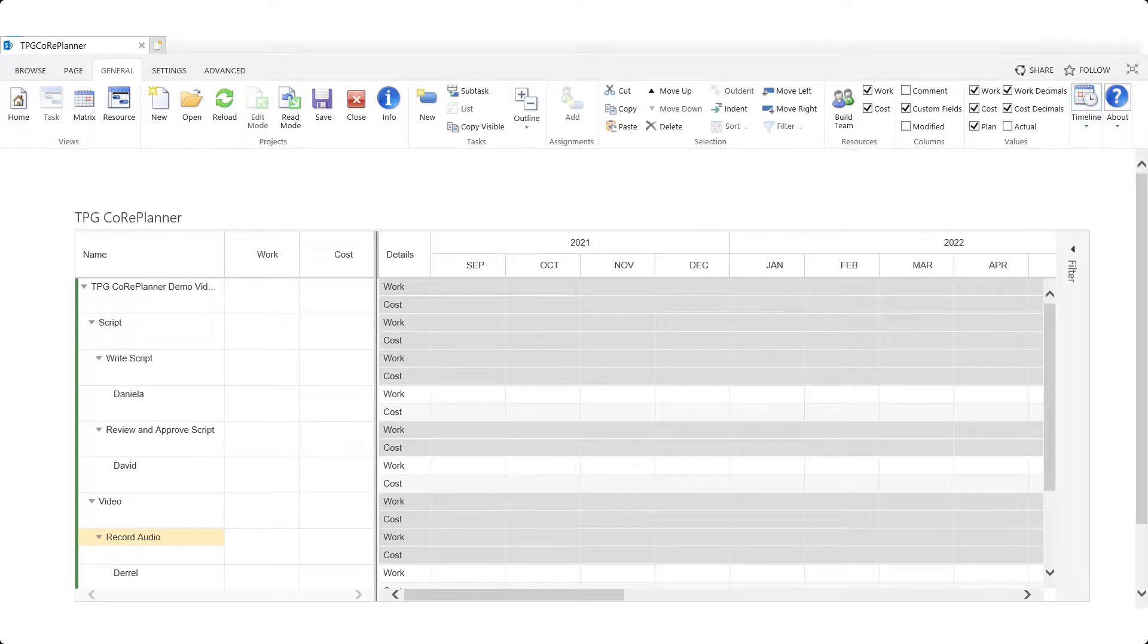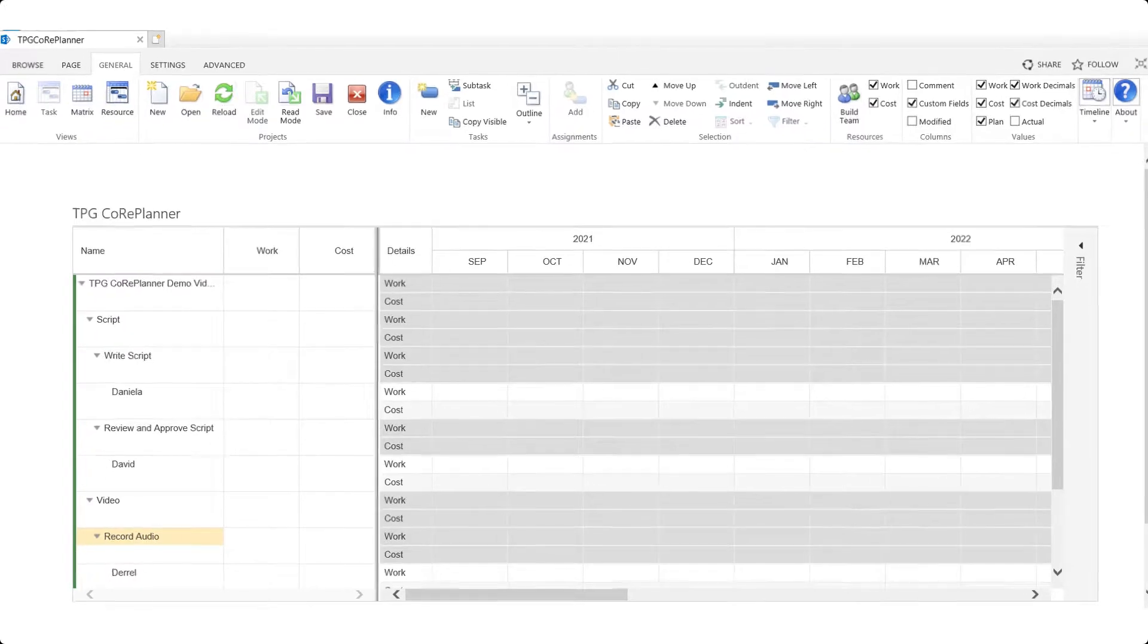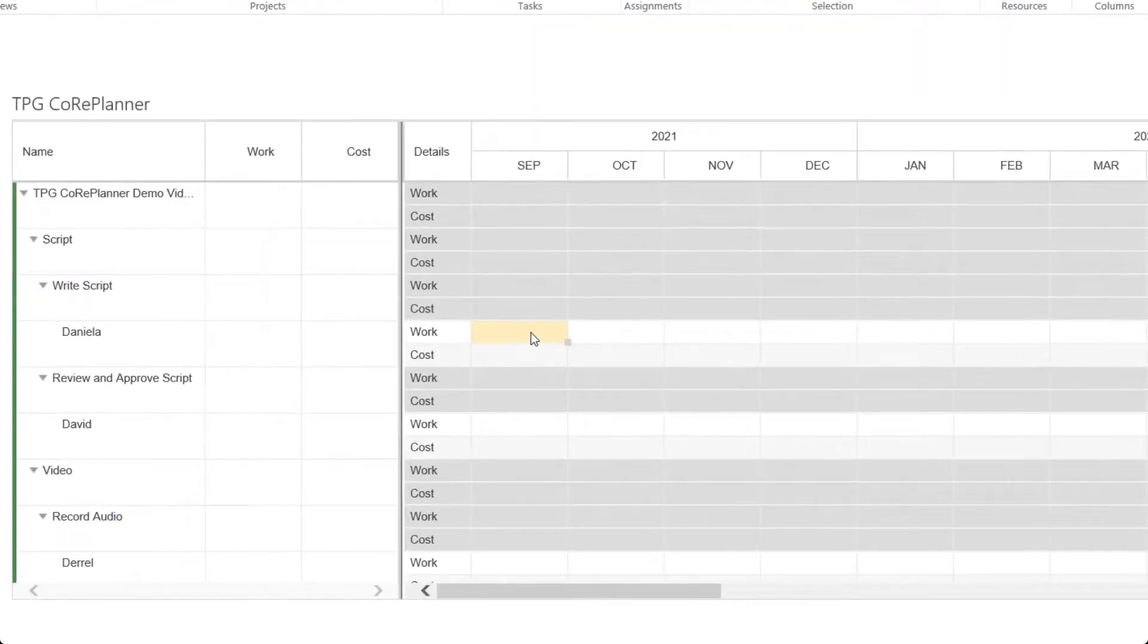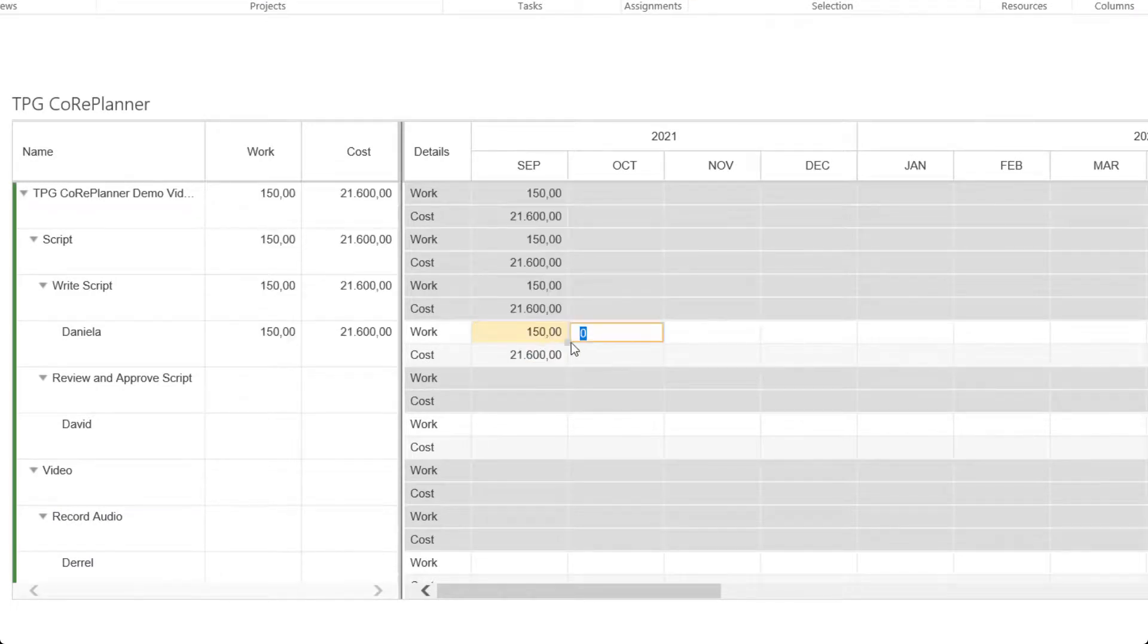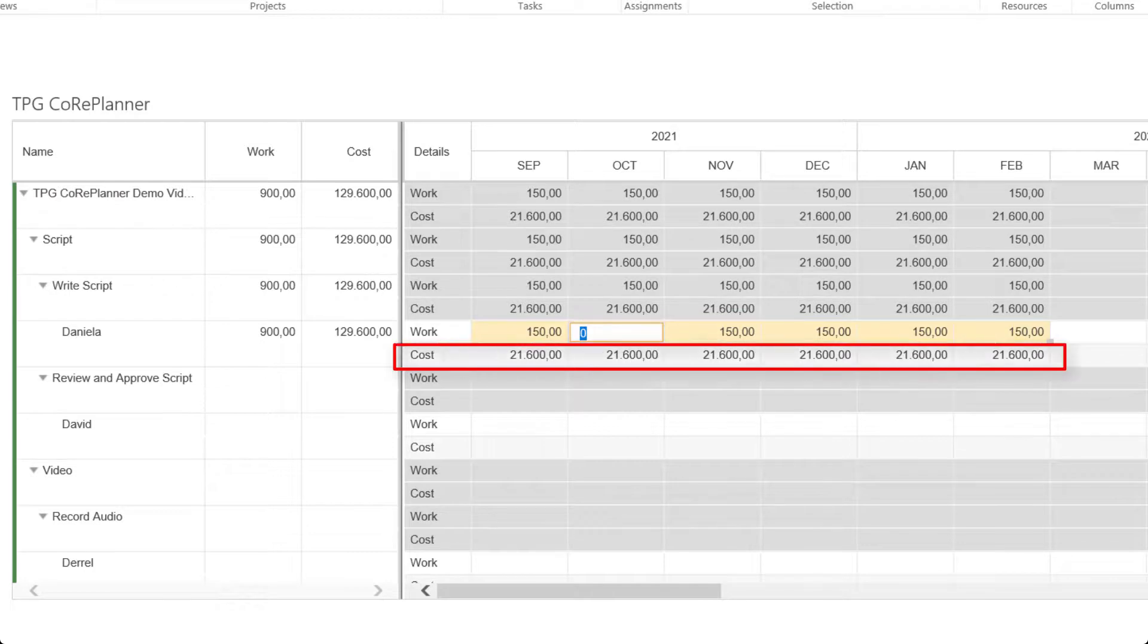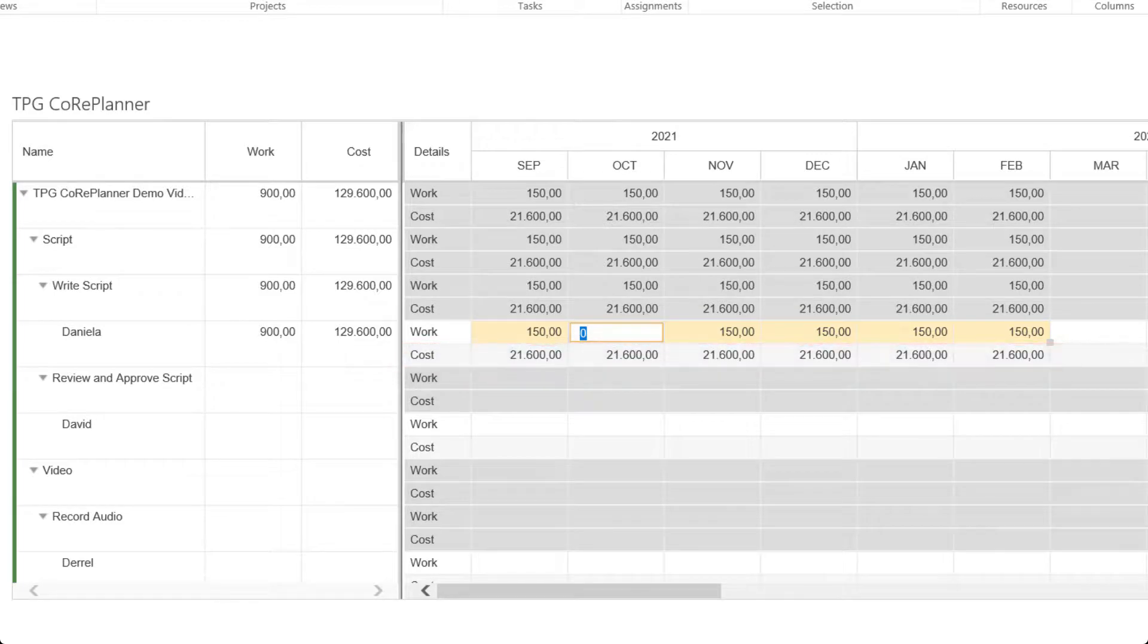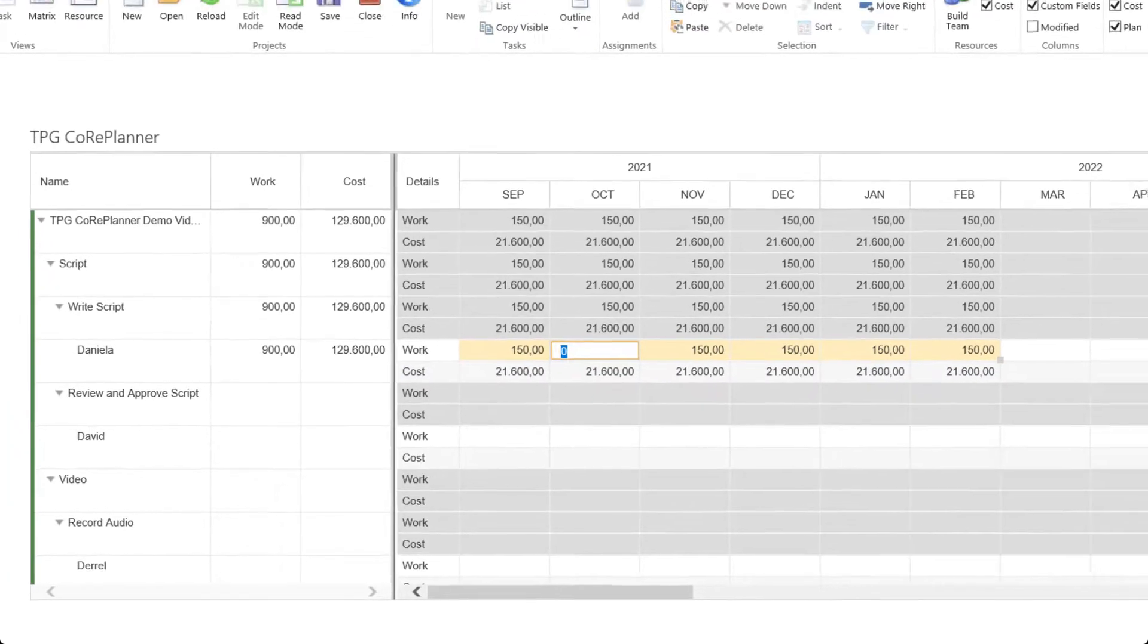Work values can be entered against assignments using the cells in the time phase portion of the screen. Using a monthly timeline we'll go ahead and enter the number of hours in the work cell. Notice the cost calculation is automatically calculated given that the resources have a rate already within their profile.